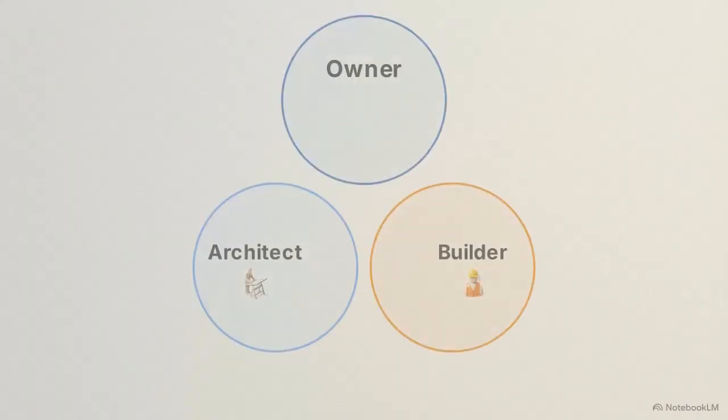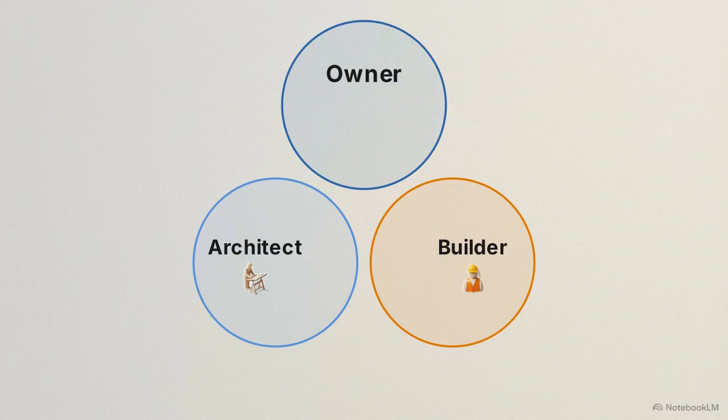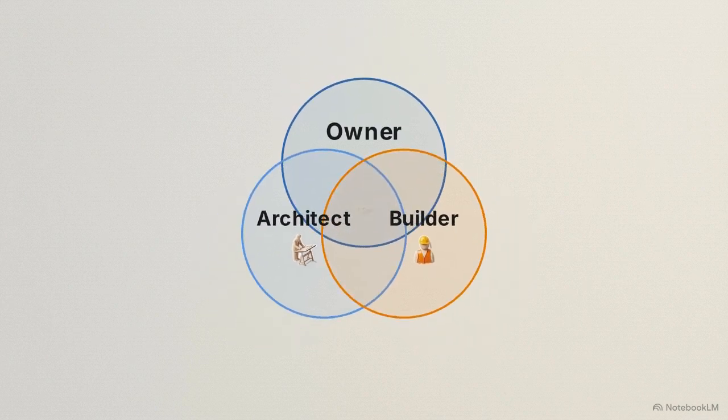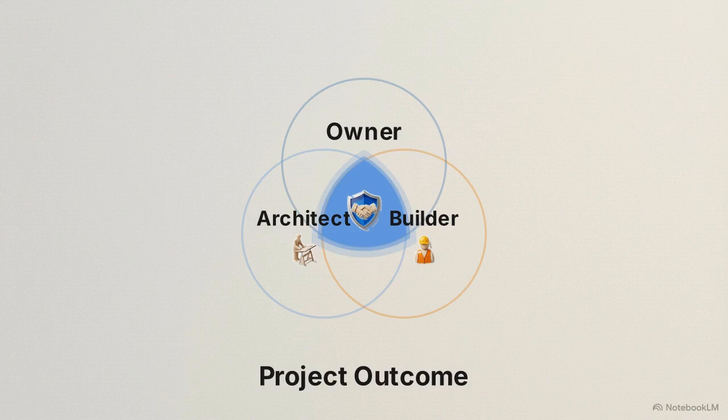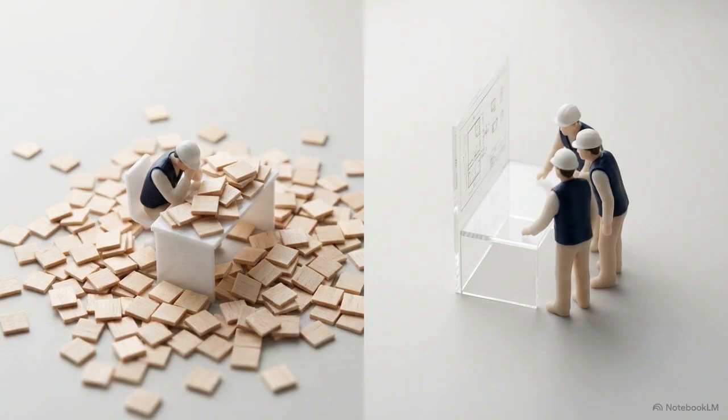This Venn diagram shows the structure of IPD. The owner, architect, and builder sign a single multi-party agreement with liability waivers. They pool their financial risk and reward, agreeing to share the gains or losses based on the project outcome, not their individual contributions. These outlier methods strip away standard industry firewalls. You either need the internal resources to manage agency or the open book accounting to trust IPD.